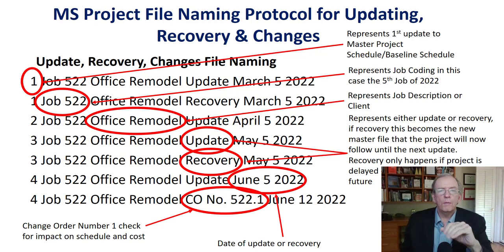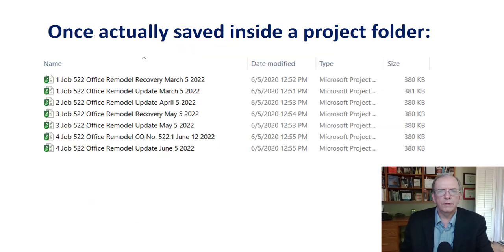And actually you can go back and you can do a contemporaneous analysis, and if it's a more complex claim, you can start from the beginning of the project going plus and minus all the way through the project to really come to a better understanding of how this project evolved and more clarity on what the overall issues were and whether a claim is valid or not valid.